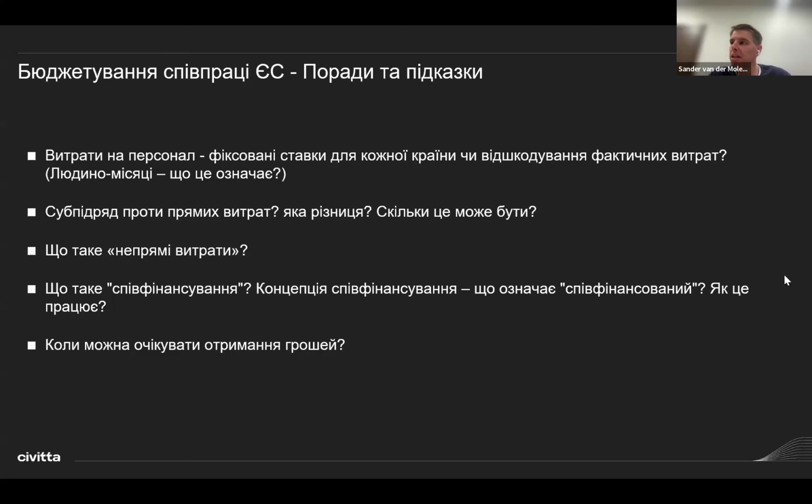And the European Commission now said, well, we found some discrepancies and we think you need to pay back 50,000 euros. So the coordinator says, well, our project is done. We received all the money from the European Commission. But since one of the project partners needs to pay 50,000 euros back, we're not going to pay all other project partners their share of money. Because guess what? If the project partner doesn't pay the money back, somebody else has a problem. There's a gap of 50,000 euros. So we'll keep them as a coordinator, all the money in our bank account, and we'll wait till the project partner pays back 50,000 euros of non-accepted costs.